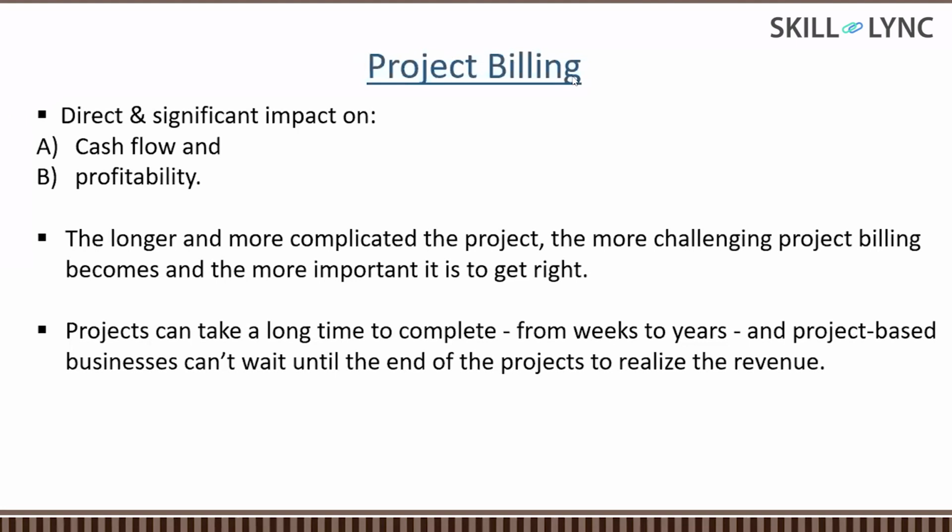So can we claim the money for purchased materials? It depends on project to project. Now we will see what comes in the project, like in the water project we have taken as an example, or a building project. This project will have a lot of items. Then we will analyze what has been mentioned in our contract document, whether we have to go item rate or milestone basis. And if we are going for item rate or milestone basis, is there any condition that if we procure all the steel, cement, concrete and pipe initially at the start of the project, we will get the payment or not? That's why contract management is very important.